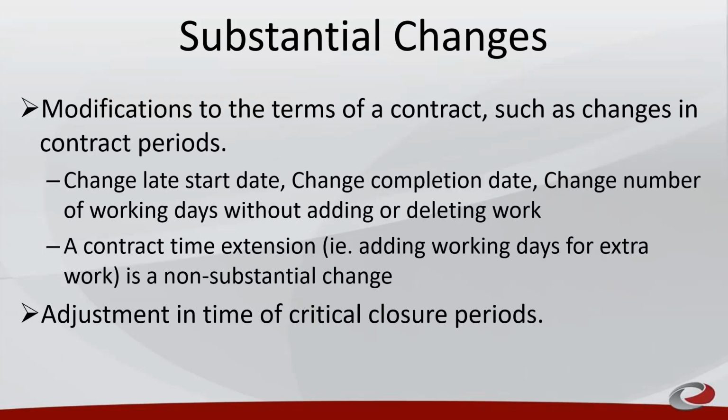Modifications to the terms of a contract, such as changes in contract periods, change of the late start date, change of the completion date, change in the number of working days without adding or deleting extra work. A contract extension of time, for example, adding work days for extra work of a non-substantial change, is not a substantial change order, but adjustment of time and critical closure periods is a substantial change order.